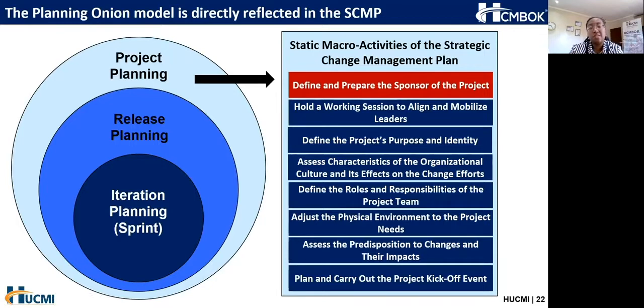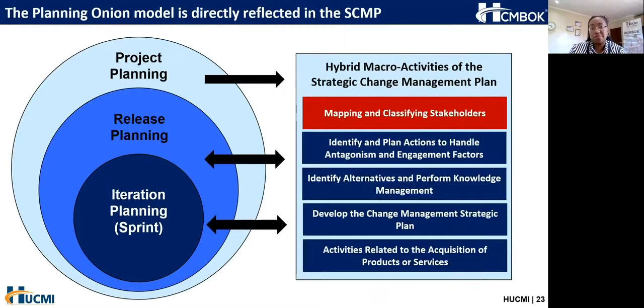And in the kickoff event, you will also include all the relevant stakeholders that are going to be involved, generally speaking, in the project: your decision makers, your key sponsors, your suppliers, all of your key partners, learning and development, human resources, group well-being. I would include all of those because at some point later, they will have a role to play. And being part of a kickoff is also seen as quite a big compliment, from a project perspective.